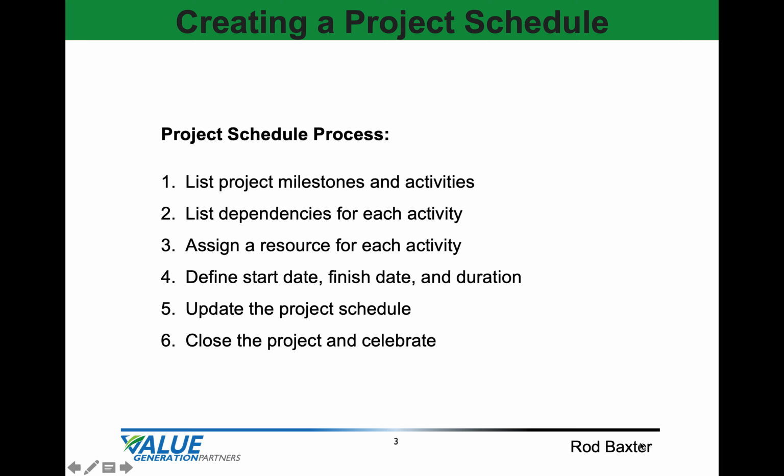The process for creating a project schedule includes: list the project milestones and activities necessary to complete during the project lifecycle. Inputs to the schedule may include the charter, requirements document, and work breakdown structure. List dependencies for each activity, such as finish to start. Predecessors must finish before successors can start.